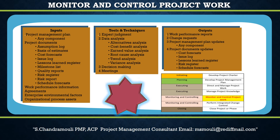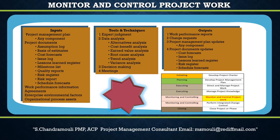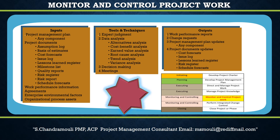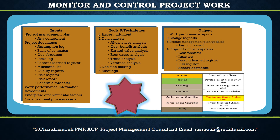The next input is Cost Forecasts. Cost forecasts are derived from progress against the cost baseline and computed estimates to complete. This is typically expressed in terms of Cost Variance (CV) and Cost Performance Index (CPI). An Estimate at Completion (EAC) can be compared to the Budget at Completion (BAC) to see if the project is still within tolerance ranges or if a change request is required.